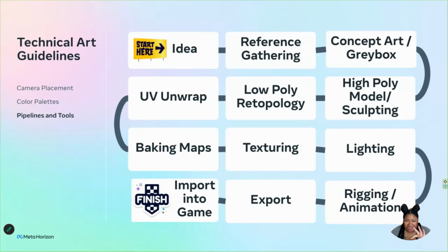If you know that the character design has to be locked before you can design any of the vehicles, you also want to plan for that because that's going to affect your scheduling, right? The pipeline for sure can be complex like this, but you can also plan to optimize it.